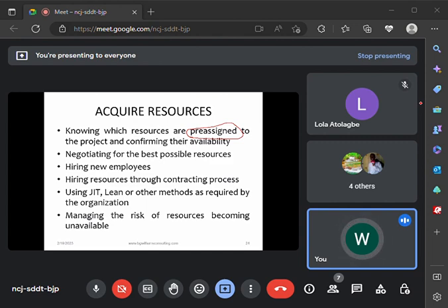And I also want Kunle in the engineering department to work with you. Remember, at this point you have not started the project, but it is the project sponsor that provides the resources. Resources provided by the project sponsor, even when the project has not even started, we refer to as pre-assigned resources.